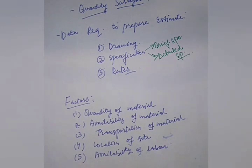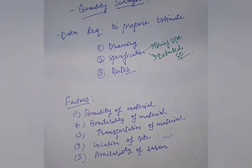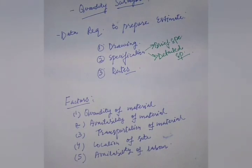The fourth factor is location of the site. If the site is located at an odd place requiring frequent loading and unloading, damage or loss of material will occur and must be carefully considered. The fifth factor is availability of labor. The daily wages of local laborers should be considered before preparing any estimate; as far as possible, locally available labor should be engaged, as they will have lesser wages compared to laborers coming from a distant place.